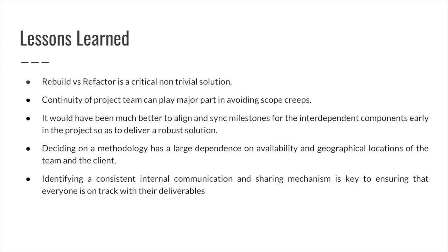has a lot to do with the nature of the teams. The team and the client were remote, and that had a big impact. So although it was helpful to have a waterfall model to help us think through the big chunks of work that needed to be done, the sequence of it was more carried out in an agile manner. And I think that played a critical part in some of the issues that we faced. And lastly, identifying a consistent internal communication and sharing mechanism is key to ensuring everybody stays on track, especially dealing with remote teams and remote clients.